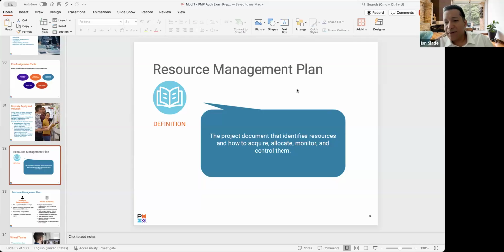So they're also part of the stakeholders. Now, everyone else that doesn't have a task assigned to them, are they going to be in the resource plan? No, right? Because they're not a resource for this initiative, for this simple party that we're trying to put together. So the key word again is task.